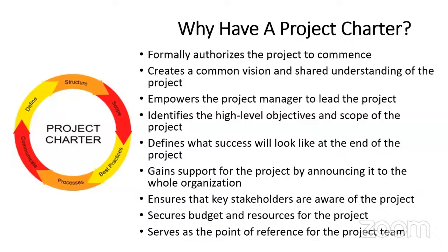It empowers the project manager to lead the project, and identifies the high-level objectives and scope of the project. Now, the other levels of objectives will be captured in the project management plan. But for the charter, we are just interested in the high-level objective, the high-level scope, the high-level deliverables. It defines what success will look like at the end of the project, gains support for the project by announcing it to the whole organization, ensures that key stakeholders are aware of the project, and secures budget and resources for the project.